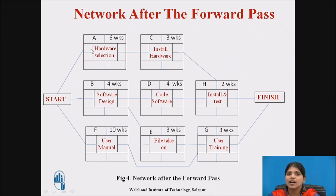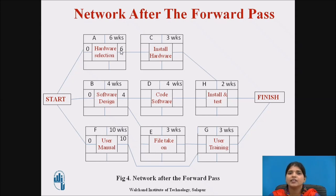The forward pass is used to calculate the earliest start and earliest finish dates. Activities A, B, and F are immediate activities, so write zero as their earliest start. Then calculate the earliest finish: earliest start plus duration. For A: 0 + 6 = 6. For B: 0 + 4 = 4. For F: 0 + 10 = 10. For C, the predecessor A finishes at 6, so earliest start = 6; earliest finish = 6 + 3 = 9. For D, predecessor B finishes at 4; earliest finish = 4 + 4 = 8.